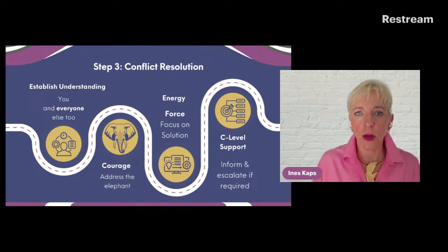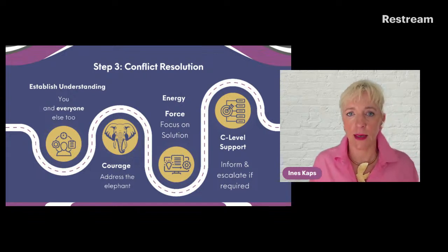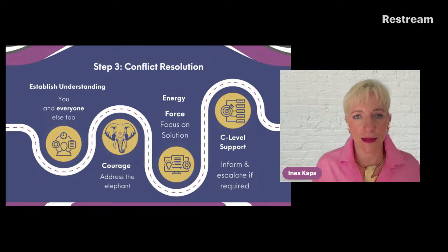If you accept not finding a solution, maybe that is the solution for the time being. You don't have to solve everything at once for this project. Maybe there is a step two. Maybe it makes sense to solve this topic at a later stage. So deciding we do not find a solution in this time frame, and we accept not to have a solution, that is a solution in itself. And it is really necessary that you communicate this clearly, that you document this clearly, and then you can move on.